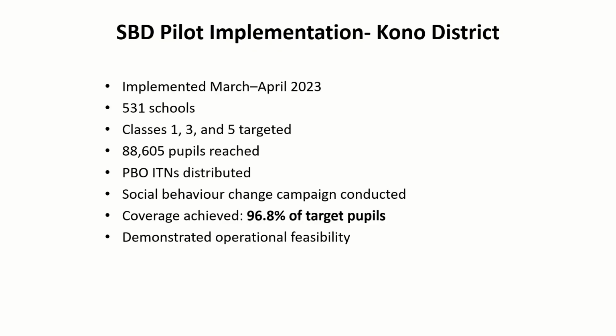In 2023, we implemented the pilot in Kono district. We targeted 531 schools in classes 1, 3, and 5. We were able to distribute 88,605 PBO ITNs and reached these pupils with strong behavioral change messaging on net use and care. We attained a coverage of 96.8%. This demonstrates operational feasibility and acceptance of school-based distribution.